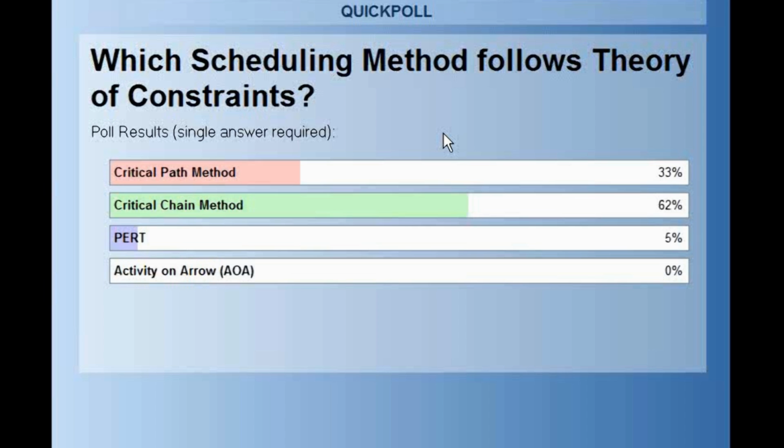The how part of it is how well do you know your team members, how well do you know your tools, how well do you know your technologies? The more you know how, the more you know what, your buffers will start shrinking. The less you know what, the less you know how, your buffers will start increasing because you want to meet the target. Now, if you are not going to an airport, if you are going to an office and you don't care if you get late by 10 or 20 minutes because you can explain that to your project manager or your boss, then you don't put that much buffer again.